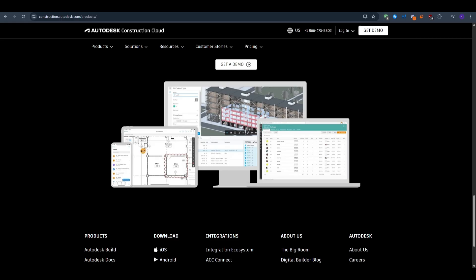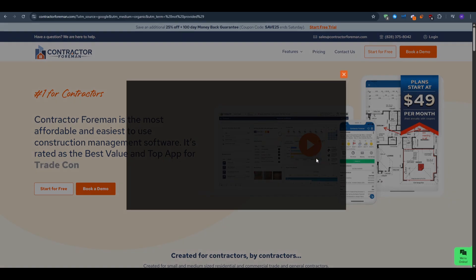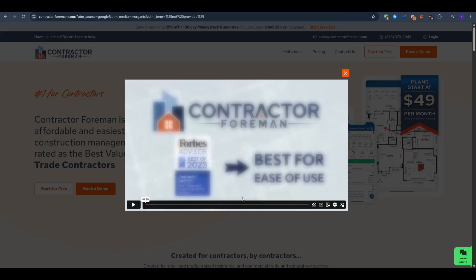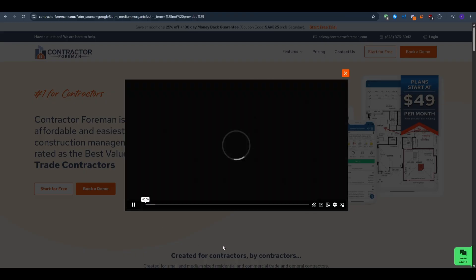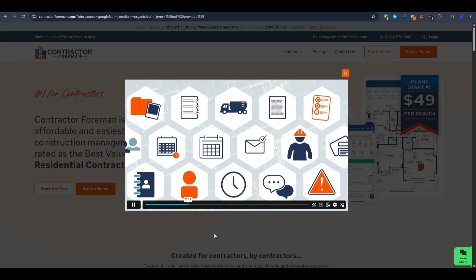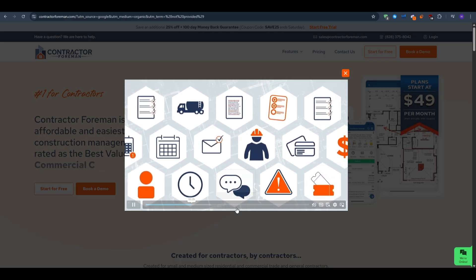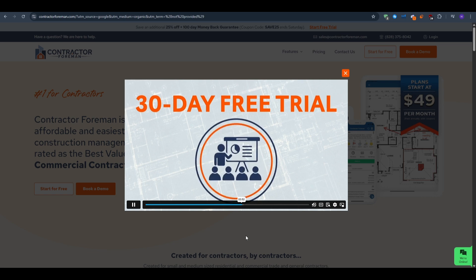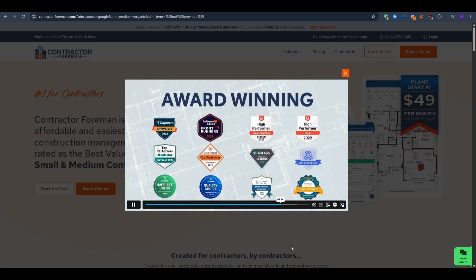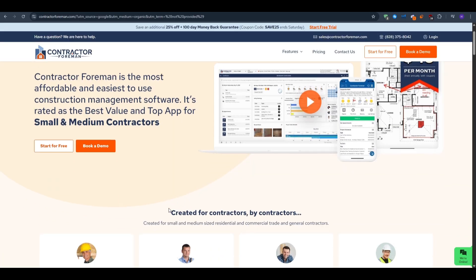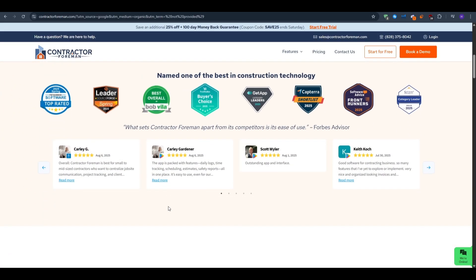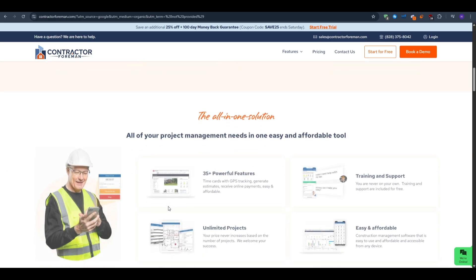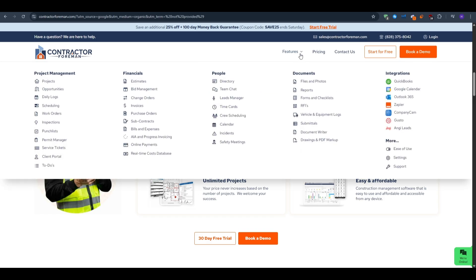Third on the list, we have Contractor Foreman, the budget defender for growing crews. This one focuses on end-to-end control without enterprise fees. They have the all-in-one philosophy - estimating, bids, daily logs, permits, change orders, and Gantt scheduling on top of real-time job costing with unlimited projects. The price stays flat whether you manage four houses or 40. You get financial clarity, drilling from a red line on the dashboard straight to the offending cost code or purchase order. QuickBooks Sync is native. We also have geofence time cards - employees must clock in inside the site radius. Managers set the allowance in feet, not miles.